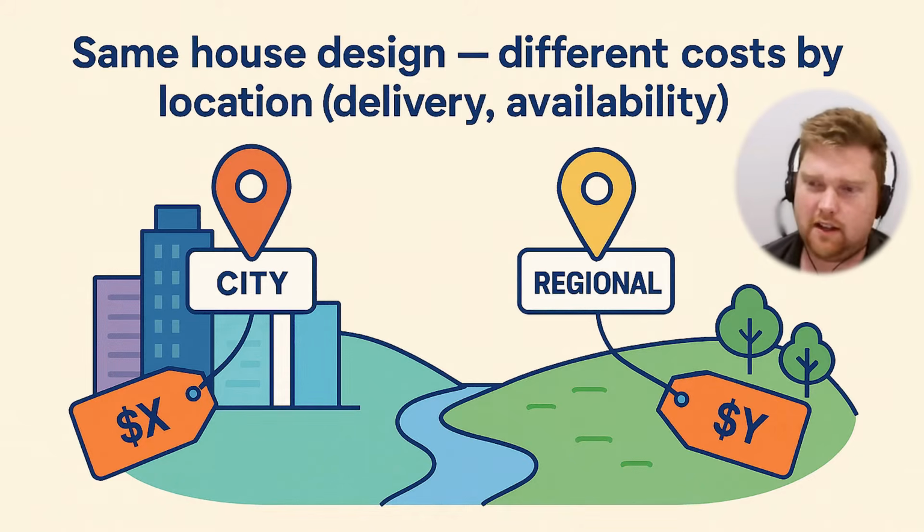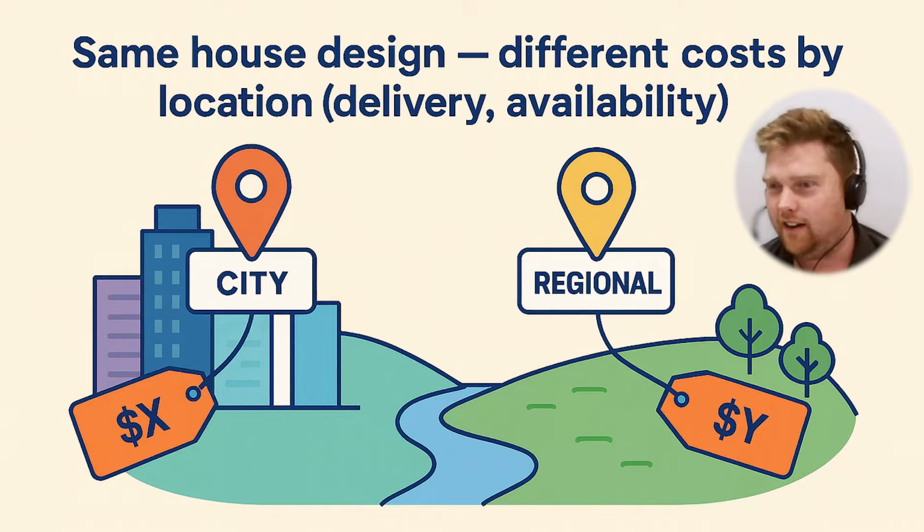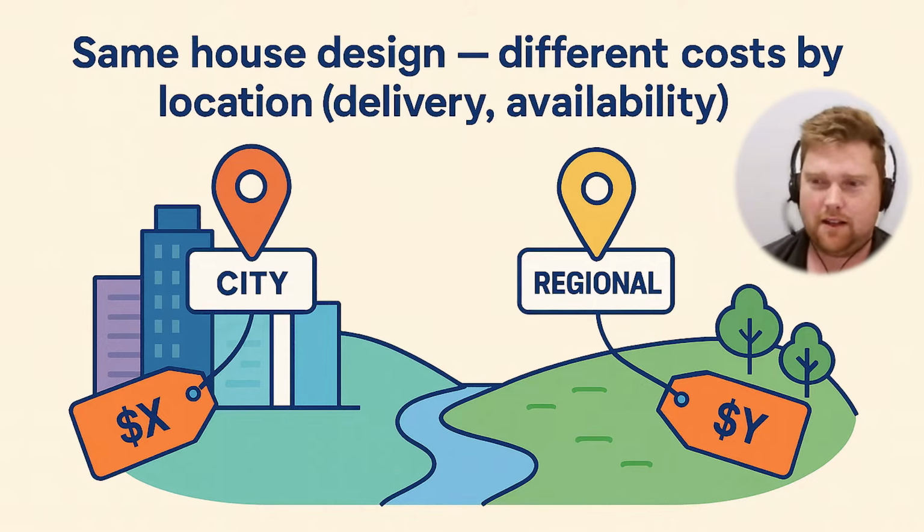Cool. And I think that's one of the other key things, that you and I always laugh because you're in Goulburn, which is regional, and I'm from a town that's way smaller that I think is regional. But it means that we understand the same thing: where I grew up, you could build the same design house as project builders do, in a town only an hour and a half, 45 minutes away from the city, and it's going to cost way different purely because delivery costs and material costs are different.